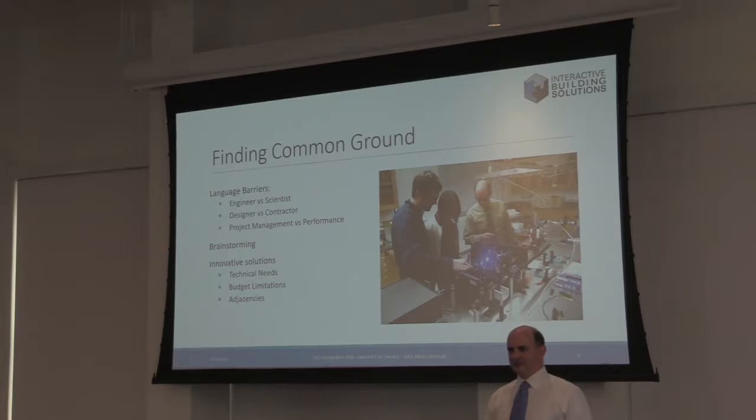You compare that to a thriving lab, which turns over, I don't know, $1.5 million of grant money each year, meaning about $400,000 donated back to the dean each year. You look at what it would take to do this well up front if you have the right planning, and it's a pretty good business case. Every new faculty member at a university like the University of Chicago costs about $3 million. It's about $1 million of renovations, about $1 million of startup, and about 7 years of salary plus benefits plus overhead. So it's a $3 million investment when you go in to do this, and the actual amount of money that it takes to do it right is not that much. Taking a little extra time to do this is valuable.